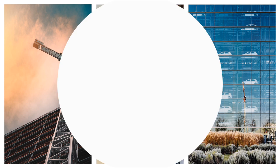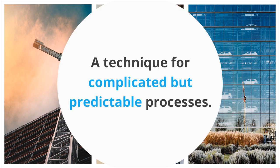While the phase gate is often hailed for its benefits, it is not a process for every single organization. It can be a great fit for big organizations where a hefty upfront investment — be it time or money — is typically needed to deliver a product to market, or in industries with specific regulatory constraints. Complicated projects like developing a new drug or a smartphone device are fundamentally predictable, and hence can be successfully planned out in advance and benefit from the phase gate process.